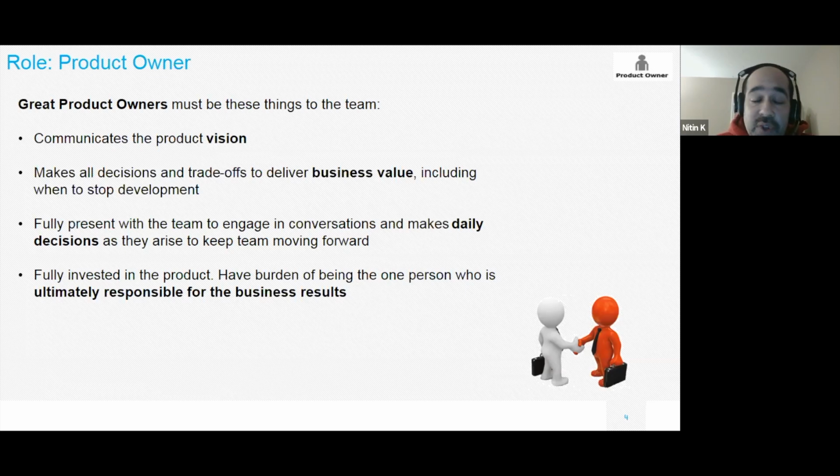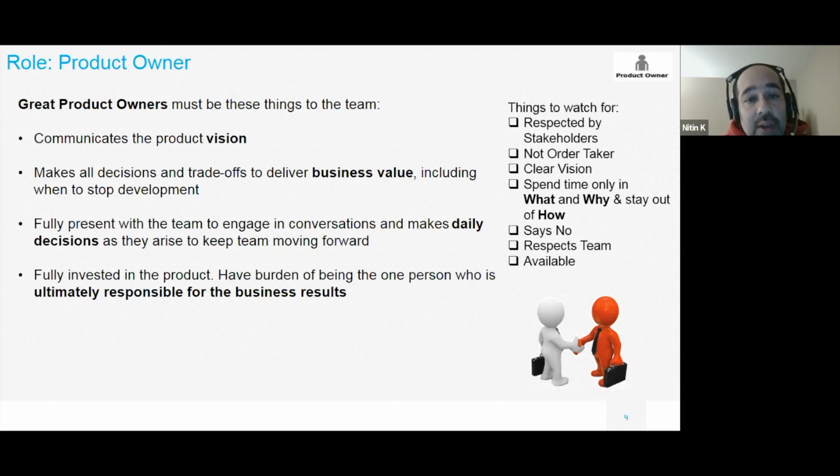And yet they are fully vested in the product. They can lay out a possible roadmap and look a little ahead. And they're truly the voice of the customer. One thing to remember is this is not a committee. This is one person, and one person alone, who can say yay or nay at the end of your typical 2-week cycle to say, yep, this is what was requested, and yes, this is built, so we declare it done.